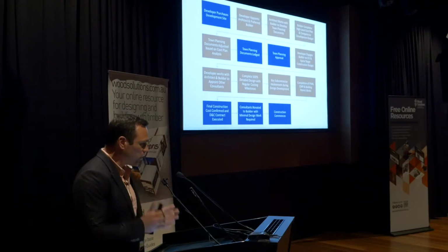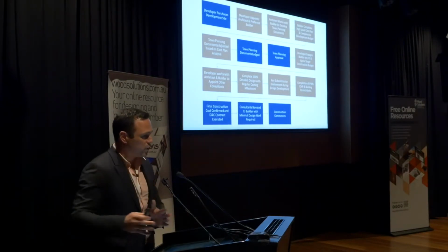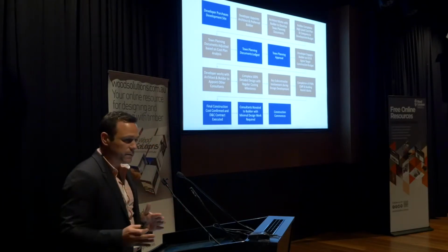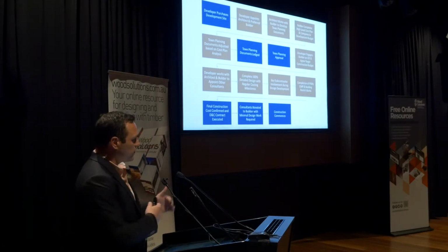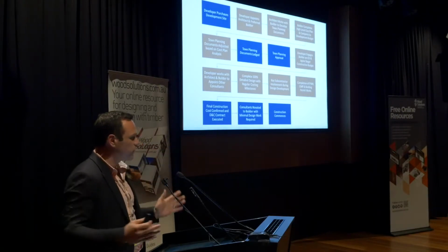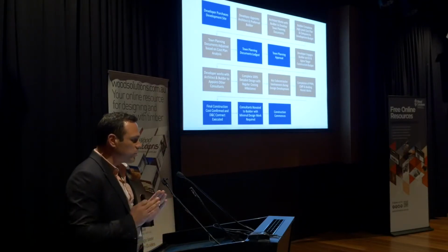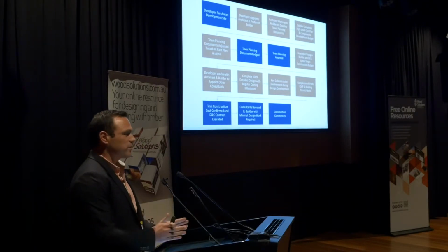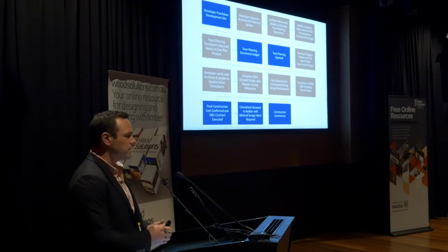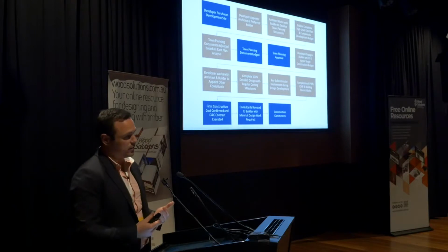And you sign an agreement with them that aligns with your contract. And you bring them on the journey. And you do that for 60, 70% of your total construction cost. So the risk is really being distributed across numerous people, numerous organisations, and these subbies will give you everything. Their job's already signed up. They've got a target budget. They'll give you the resource. They'll give you the people. You'll actually get efficiency out of that process. Yeah?